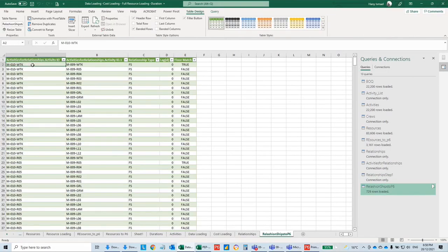Now, if you can see, this water tank slab is linked with column of water tank and column of R5 and column of R4 and column of R3 and column of R2. This is not correct, right? I need only the same floor. In other words, when the floor match is true, all the false are not applicable, because I will not link the slab of the water tank to, for example, columns of level 3.